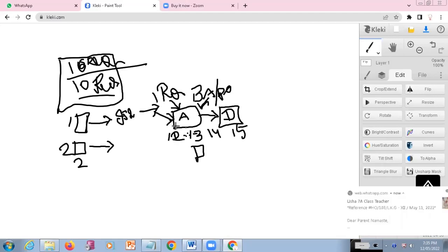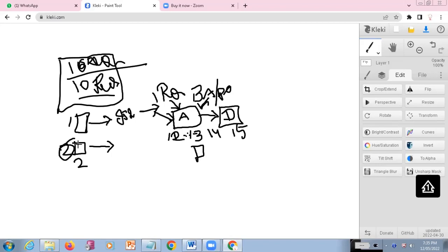So on the 12th we have started analyzing, on the 13th also we have done the analysis, and by the 14th we have almost done and provided it to the design phase. On the 13th they are going to come up with the second requirement, because the customer got clarity on it, and they have provided it to us. So we will take this requirement, and on the 14th we will start our analysis part parallelly.